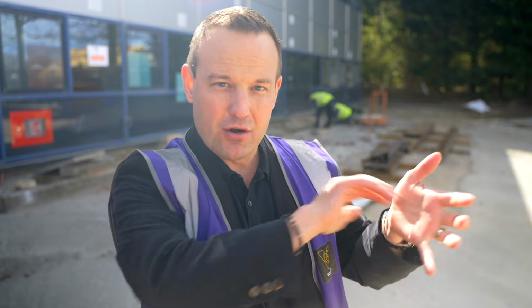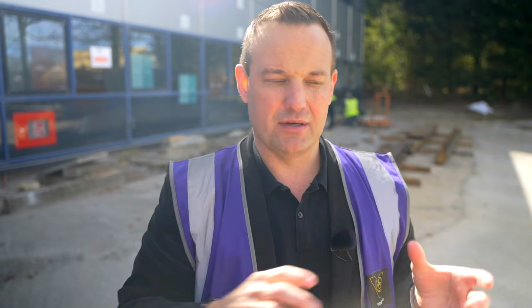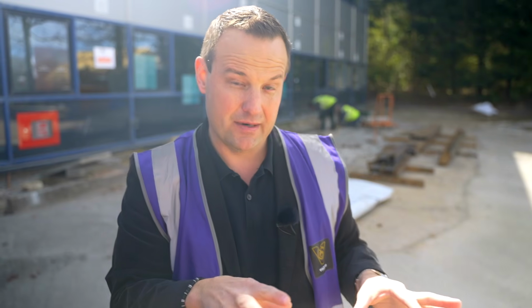You know, there's usually a brick core in some big buildings, usually around the stairwell. On commercial buildings, they sometimes have a core for maybe the lift shaft. All the services run up through the middle of the building somewhere. That can take up quite a bit of space in a lot of commercial buildings, actually. I've seen commercial buildings with up to like 30% taken up from the floor space, which will dramatically change your gross development value, your GDV. That's your end value of what they're worth at the end once you've built it.